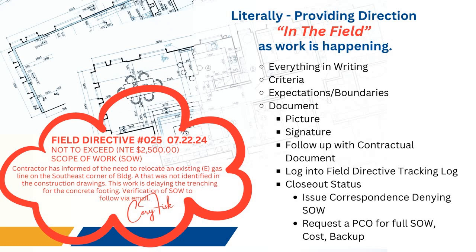We're going to want to take a picture of the situation when we take it back to the job site in order to ensure whether or not it is original contract scope or if there are portions of it that need to be clarified and therefore are able to be determined to be additional scope. And we need to put our Hancock on it. We went ahead and gave them the directive to keep the work moving. So we need to take accountability and responsibility for the decisions that are being made.